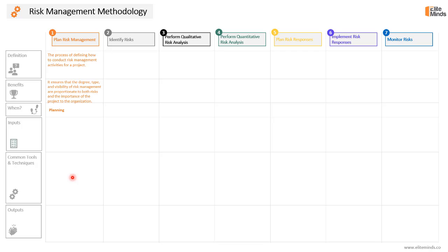This process is conducted as part of the planning phase throughout the project. In order to start planning for risk management, you need to have the approved project charter and all the components of the project management plan. You will use some project documents, mainly the stakeholder register, to know who are the stakeholders you will be interviewing in order to plan for risk management. We will also need the enterprise environmental factors and the organizational process assets.